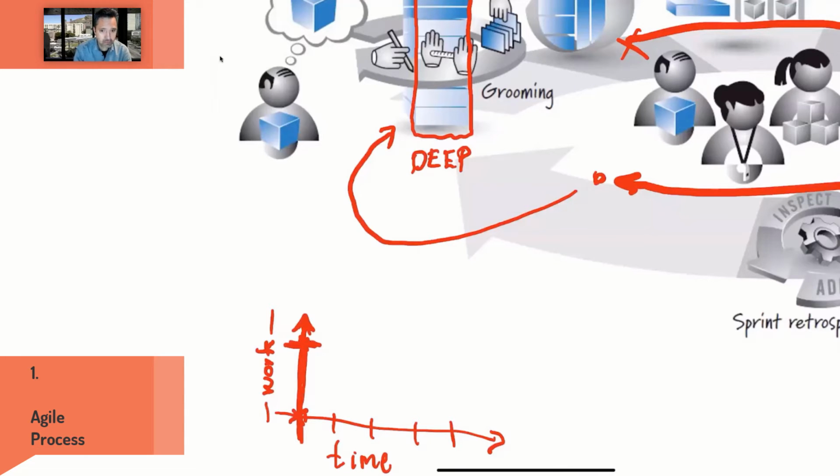Now, hypothetically, if I am here in day 0, and here is the last day of the sprint, what I should have is to be here. The last day of the sprint, my goal is to have 0 work to do. That means that I finish everything that I should have accomplished. Theoretically, we can draw a line from this point to this point, and that line represents my ideal behavior.